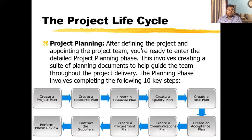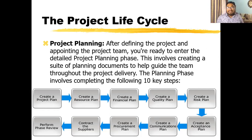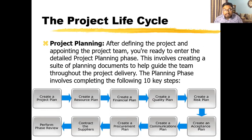The first step is to create a project plan. Once the plan is ready, create a resource plan — covering material, financial, and human resources. Then create a financial plan covering sources of funds and the project budget. Create a quality plan to ensure quality standards. Create a milestone or standard plan. Then create a risk plan — identifying risks associated with the project and the remedies for those risks.